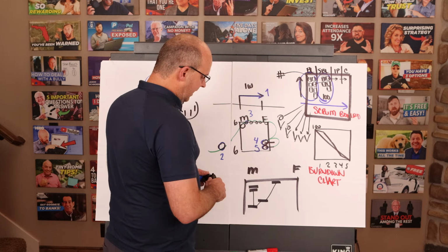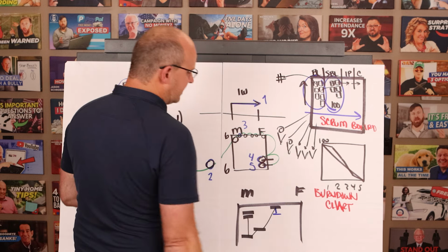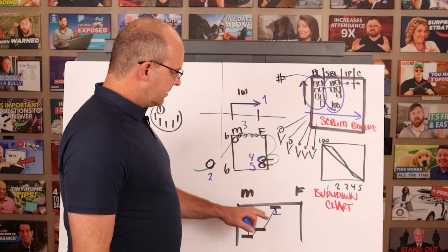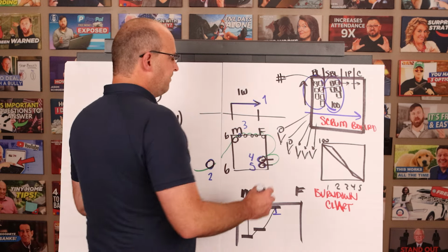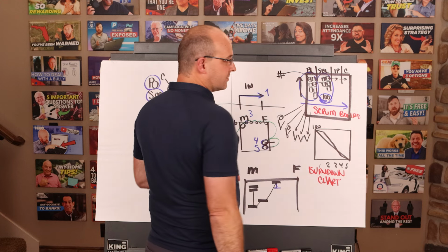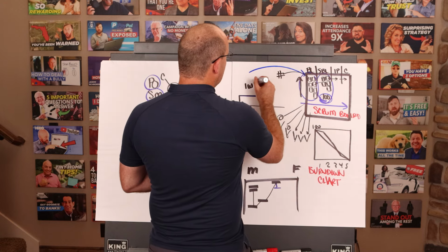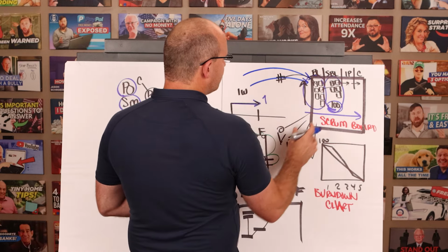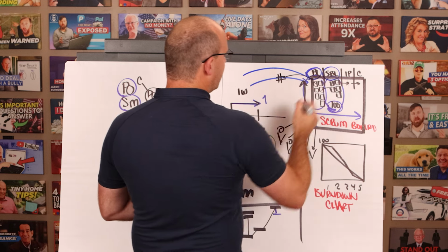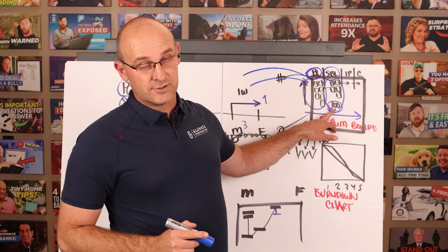That's the standard system. I love when after that we bring in a team daily huddle every day, any roadblocks that the field has to the project team. And so what will happen is we will know, typically this team has the capacity for so many points, whatever. And when there's roadblocks from the afternoon foreman huddle, from the morning worker huddle, I'll start to pull those in. And if it's not urgent, it might go in the backlog. But if it is urgent, it might go in your sprint backlog. And we'll analyze, are we going over our capacity by tracking the points?